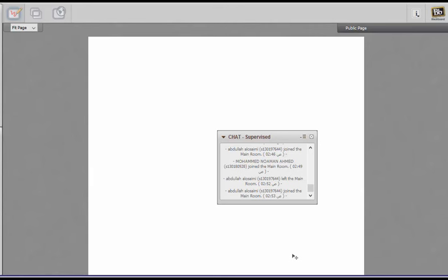You will first reduce the amounts of cost and benefit from the discounted point of view to get the actual value at this time. Then you will subtract the costs from the benefits and divide it by the total discounted costs. This will give you the value. If you multiply it with 100, it will give you the percentage as well. Very simple formula, but this can also be an applied question from chapter 4. So that is the third important question, and 2 questions so far are applied questions.